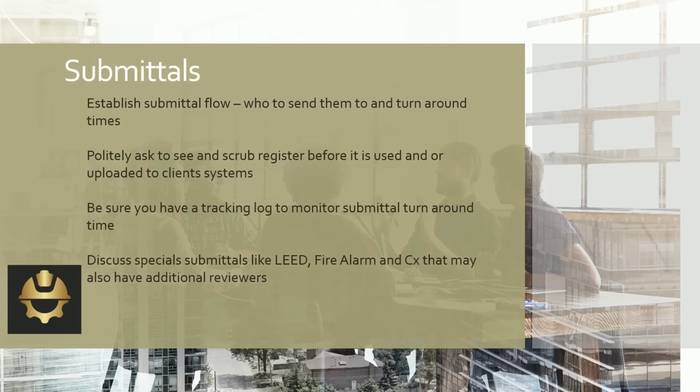Also, many design firms have a submittal clerk or a person that's going to be in charge of routing the submittals, so that you send them to only one point of contact, and then that person disseminates them amongst the design team. Keep in mind that on design teams, a lot of times they may not have every component of the design in-house. So they may hire other design firms under their umbrella. They may have architectural and electrical, but they have to hire a mechanical engineer or a commissioning agent or however it's set up contractually. That's why it's real important to understand the flow.